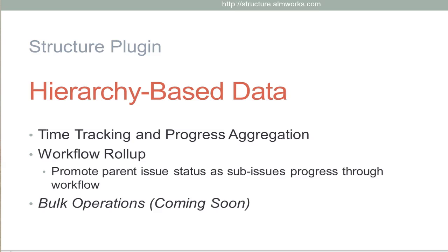Structure plugin can calculate data based on the hierarchy. As you saw, the time tracking information and progress are aggregated upwards. We have workflow rollup, which transitions parent issues through the workflow as their sub-issues are transitioned, and we will be working on more features for that.